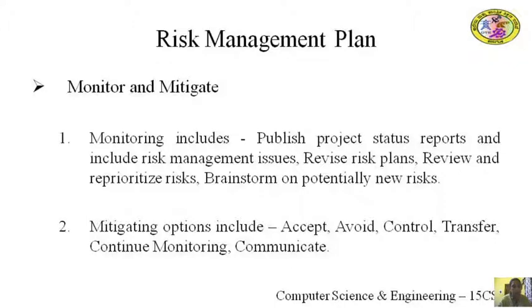Risk management plan. After cataloging all of the risks according to type, the software development project manager should craft a risk management plan. As part of a larger, comprehensive project plan, the risk management plan outlines the response that will be taken for each risk if it materializes.